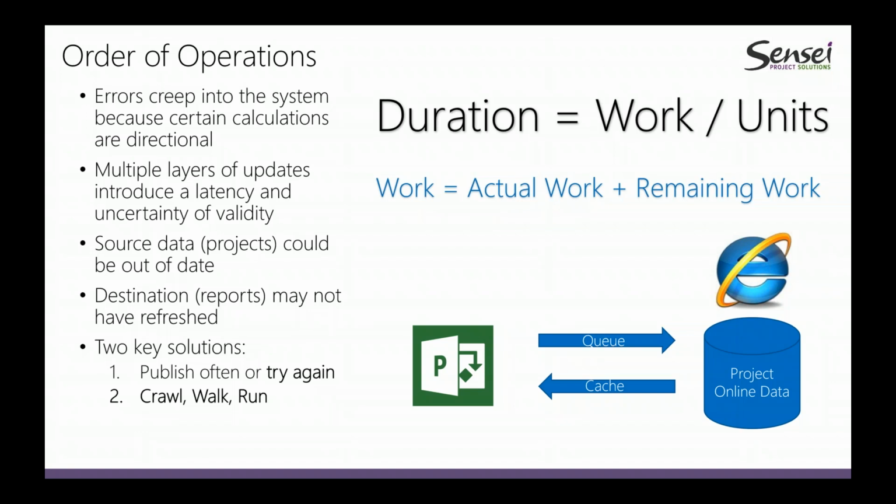And from a systemic process standpoint, when you're trying to transform an organization and you've got hundreds of project managers that have to move from Excel spreadsheets and emails, what I like to call stone knives and bearskins, from the older technologies to a new enterprise project management system, you want to adopt a crawl, walk, run methodology. So start slowly. Let's just put our project data in. Let's not worry about the other levels of data, and let's get that process going. Let's get that process right.